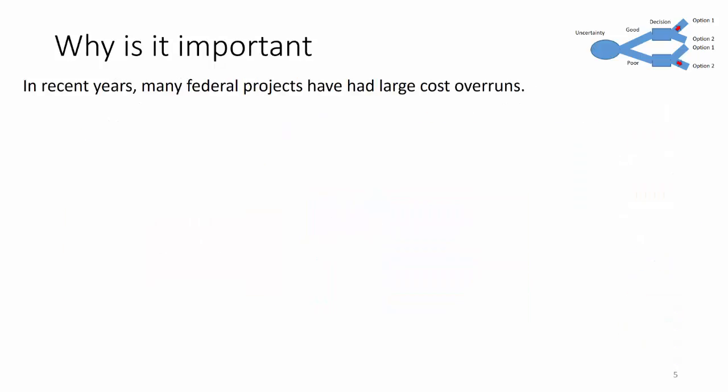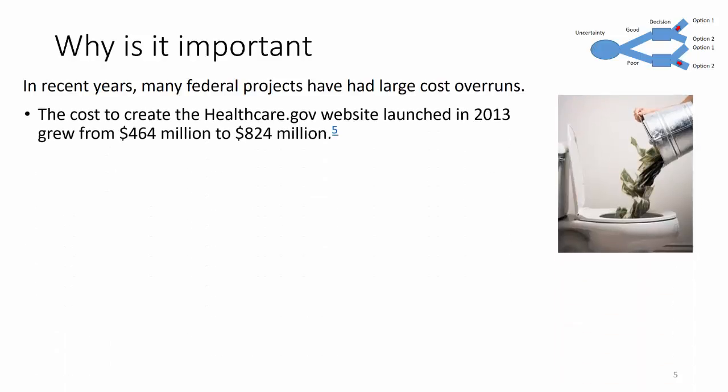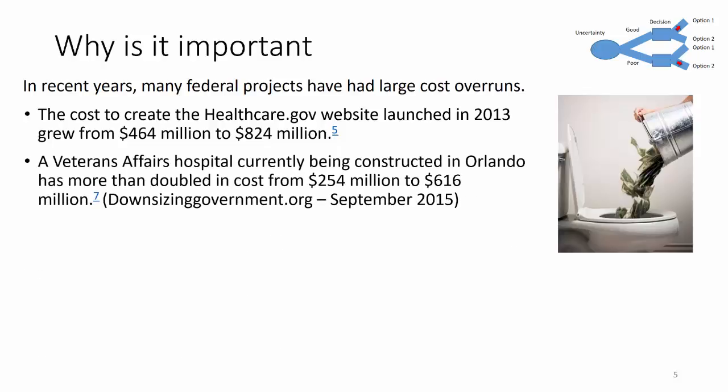In recent years, many federal projects have had large cost overruns. For example, the cost to create the healthcare.gov website launched in 2013 grew from $464 million to $824 million. And the Veterans Affairs Hospital currently being constructed in Orlando has more than doubled in cost from $254 million to $616 million, as reported in September of 2015.